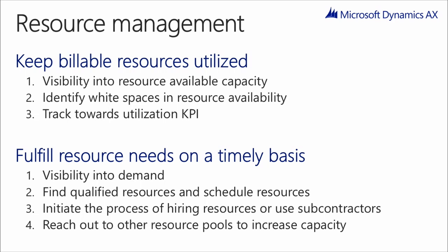When it comes to keeping billable resources utilized, you need to first have visibility into the available capacity. You need to also identify white spaces in resource availability, the small chunks of time in resource availability that can be better utilized. And you need to also track towards utilization KPIs. So you set some KPIs at organization level, and then you need to track them.